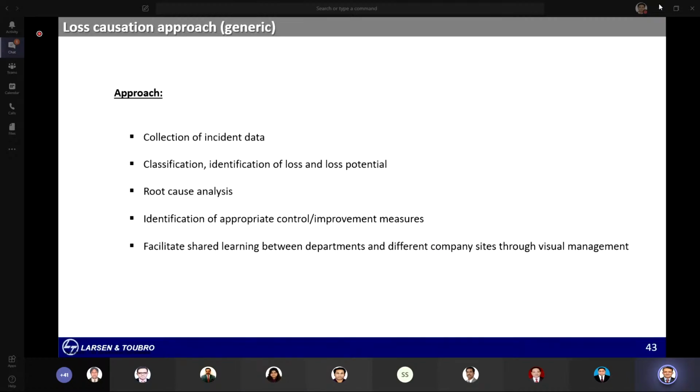In some of the organizations where I've seen, they look at what price we pay if we allow the risk to happen in order to come out of it, and that is also looked at from a cost perspective and time of implementation perspective. With these three dimensions, it's a combined weighting of these three factors that is taken to address a particular risk, whether it is worth addressing or not.